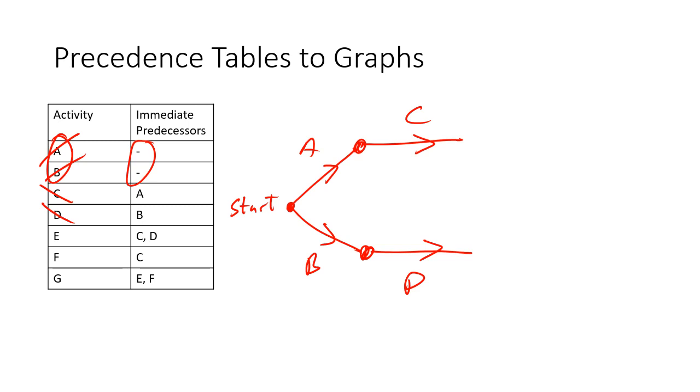Now, if we look here, we've got C, D, and C. I would rather, when you're doing these things, focus not on going down the table, but on this one first because it's only got the one letter. And I think that tends to work better. All right, so from C, we need F. So I'm going to do a line like that. I'm going to do another one like this, and I'm going to call that F.